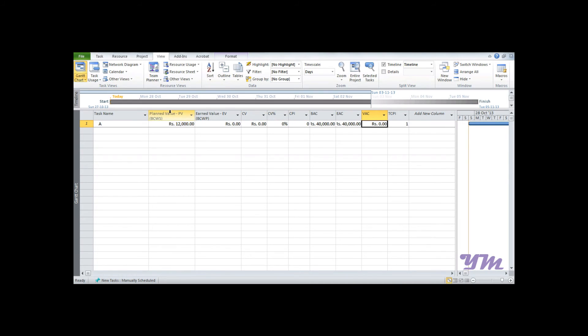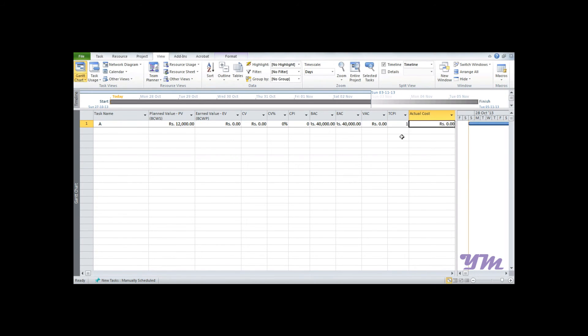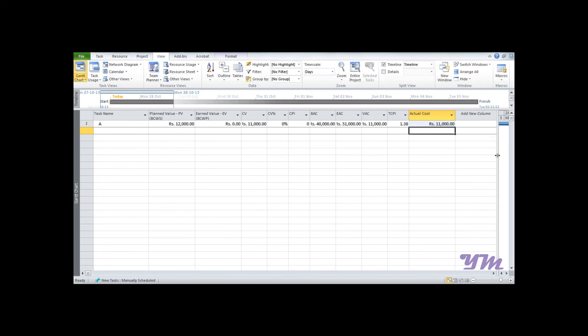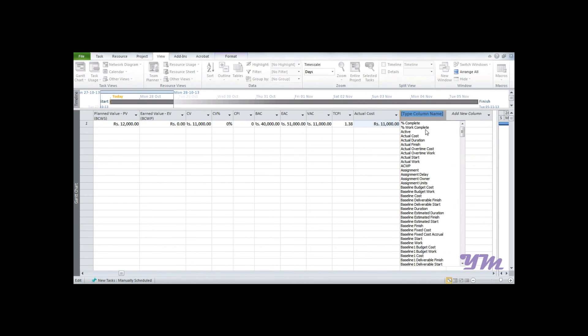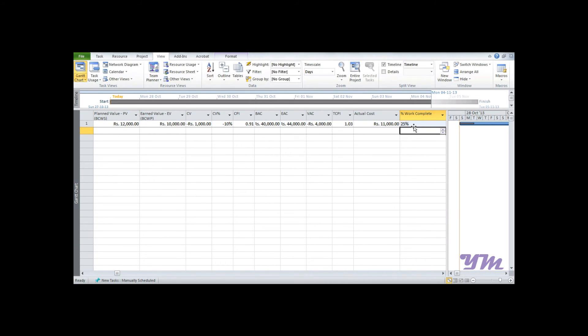In order to work further, we need to add a column named Actual Cost. Actual cost, as you know, is 11,000, so we'll enter 11,000. Then we need to add another column which is known as Percentage Work Complete, which we also know is 25%. Once you enter this value, you can see the CPI comes out to be 0.91.